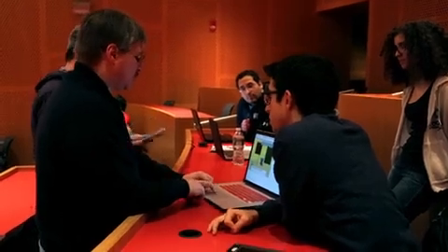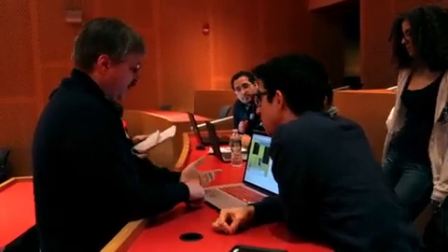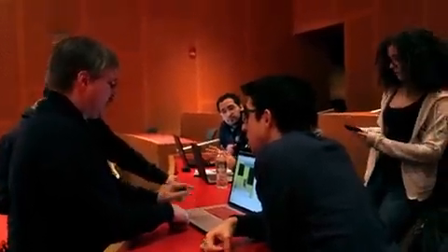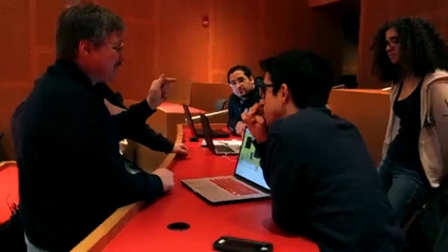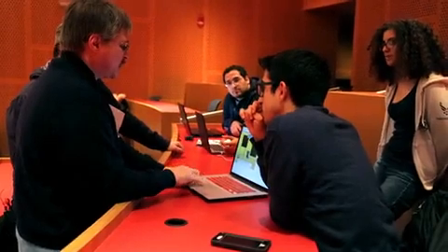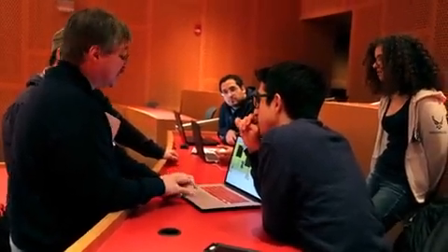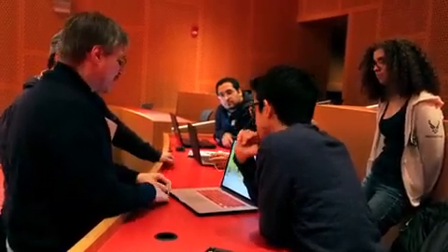Okay. All right. Cool. I'm sure you already have, but do a glance and make sure that anything that has any question marks with it is higher priority. Maybe not even finishing it. If you go over the task and think, okay, now the question marks are gone, and I'm comfortable moving it down in priority, feel free to do that. But make sure those question marks are done sooner rather than later, because anytime there's a question mark, it might become 5 question marks, and then you're in trouble. So look at it seriously as a high priority item.